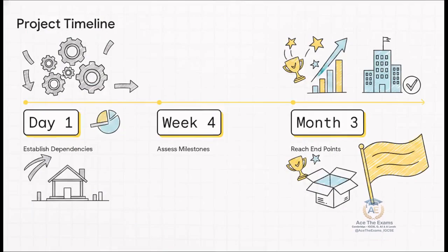Notice exactly how these pieces map out across time. On the day 1 marker, you establish your dependencies. Which tasks absolutely must be completed before another can even begin? For example, you can't run user acceptance testing before you've actually compiled the database.